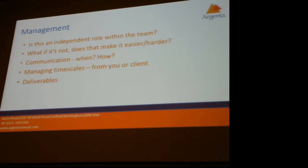That in itself would be a topic, like how to use Jira effectively, and how you go through your project management. It doesn't really support Gantt charts, whereas something like Smartsheet you could do as a Gantt chart. Then there's how you translate requirements into tasks, subtasks and epics. That's the first crucial part of managing a project, because lots of one-minute tasks isn't really going to cut it. Also timing: if you give each task an estimate, or story points, whatever you want to call it, you can track that, and other people can track that. That lends itself nicely to the management part of the process.